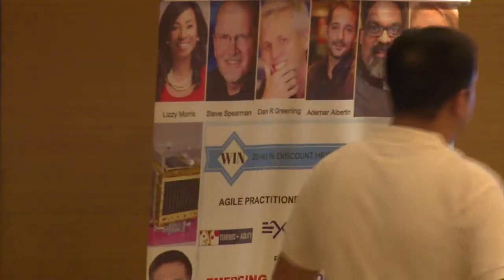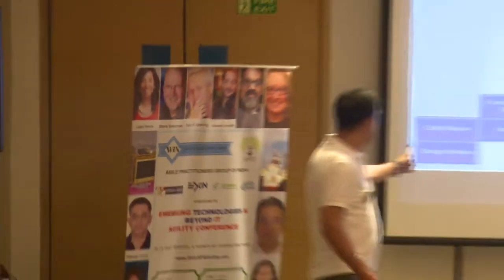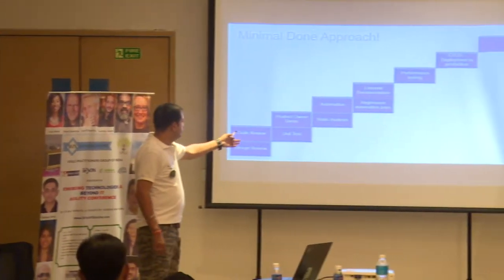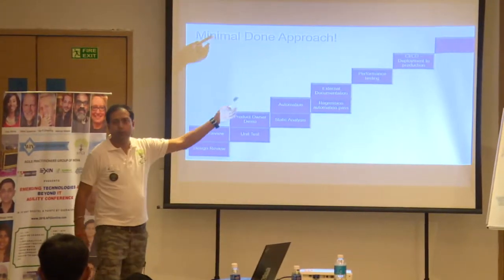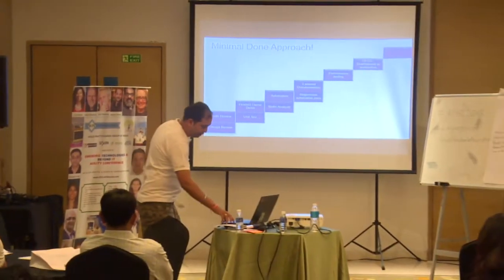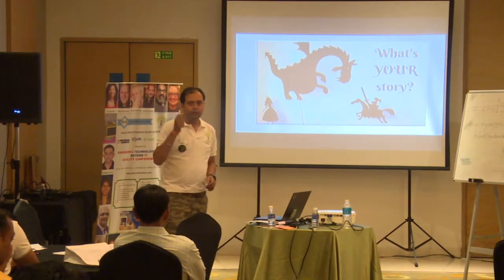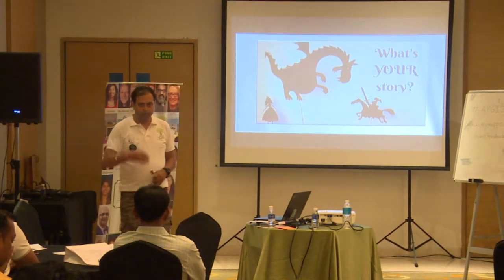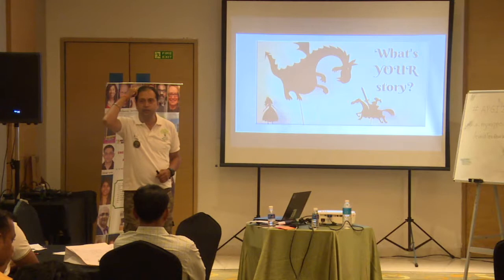So either you can go step by step. You start with code review, design review, then you go with the demo, unit test, and you go to the top. You add all the items iteratively, or you start with everything and then you start reducing things from there. So maybe we'll take one or two stories from here, on how you started and what it was.